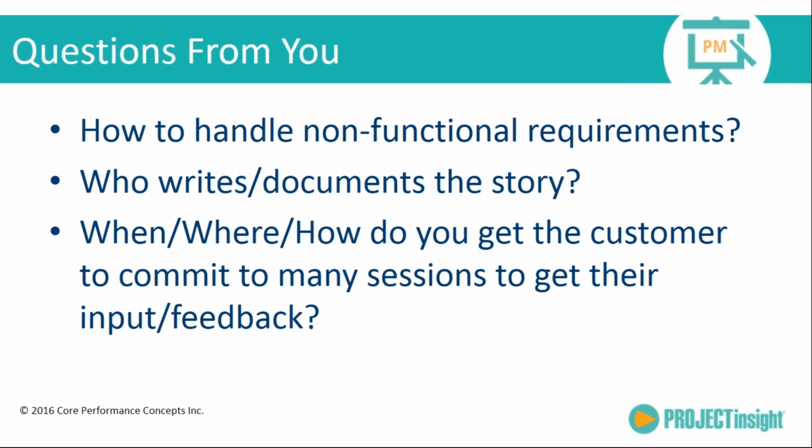The next question that came up was who writes or documents the story? Well, the best person to write that would be the person that's going to receive it and put it in terms that they understand. And there's lots of different tools that are available to help people document their stories. But ideally, it's the client. Now, if you're interviewing and the client's telling the stories and you're documenting it, great. But it should be from the voice of the customer is what you really want there.